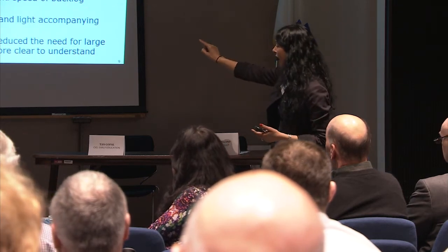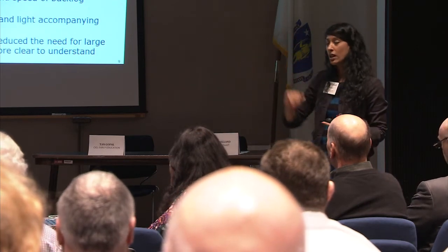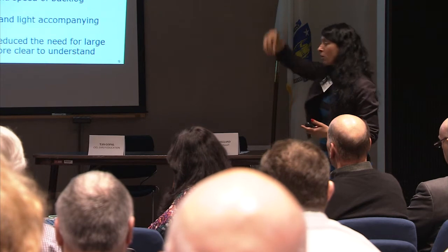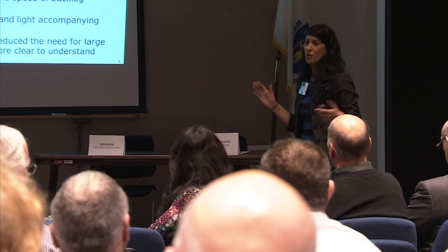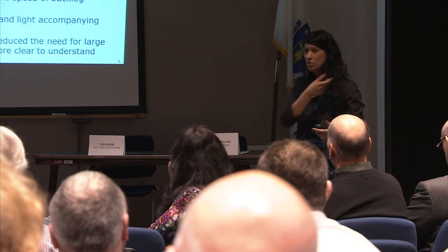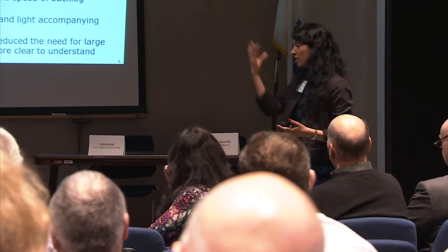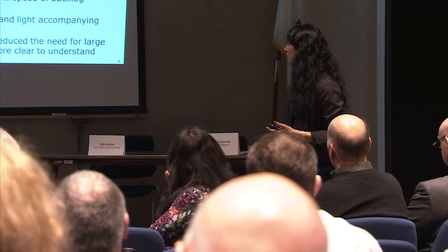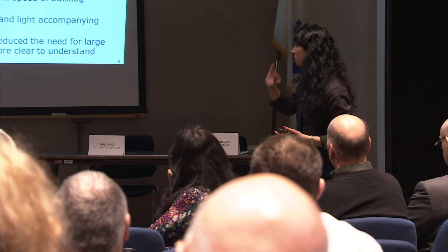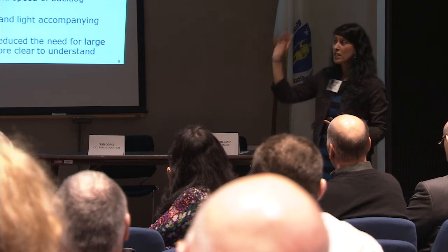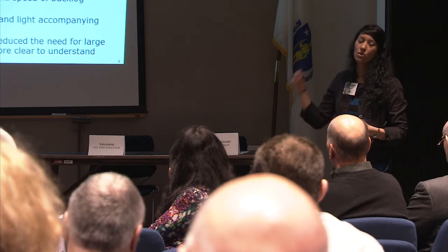What we did is we had her have a small team of subject matter experts that knew each type of licensed type of care. They reported into her. So I didn't have these large sessions with 100 people there, and I'm trying to listen to all these different ideas. Everything filtered through her so that we could have really good, meaningful sprints. And that was the speed of decision making that came. So our business requirements were incredibly light. They were just workflows. Are these the steps that happen? And then demos every single week.